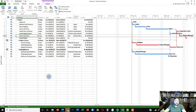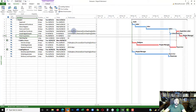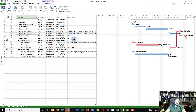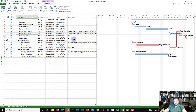Once you've done this, save the master project and the sub-projects as well. An important thing to remember is the directory structure — these files need to be in the same directory for the linking to work. If you take a sub-project and put it in a different folder, you won't see any changes, and it won't be linked anymore. So make sure that when you create a master project and sub-projects, they are all in the same folder. I hope this was useful — try it out yourself in MS Project. Thank you.